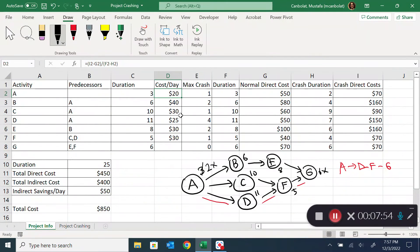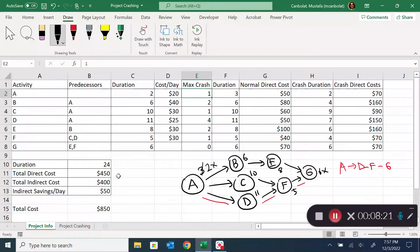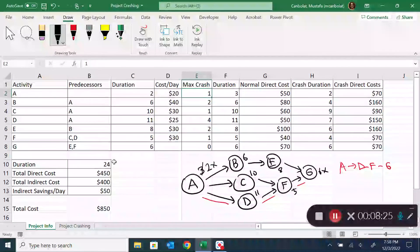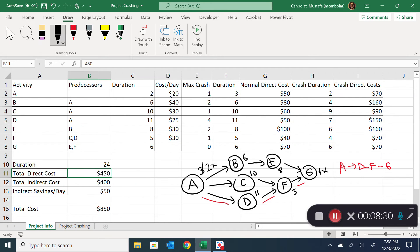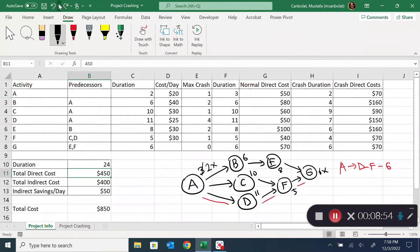The project duration is now 24 days. Activity A's duration is now two and the crash is already done. My direct cost goes up to 470 dollars — by reducing A's duration I have to pay 20 dollars extra, so direct cost rises from 450 to 470.